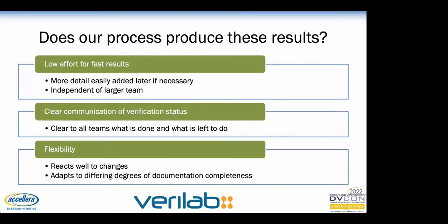For large or complex projects, we may need to further divide our deliverables. This can be done early in the project if the information is available, or it can be postponed. It can be quite effective to delay detailed planning until work is about to begin on a deliverable. At that point, we have a much better idea of what the actual requirements are and the state of the RTL and test bench. We can also take advantage of the knowledge that the team has gained during the process. Deeper knowledge of the spec and protocols can greatly simplify task enumeration and effort estimation, especially if the protocol or design specifications have matured.